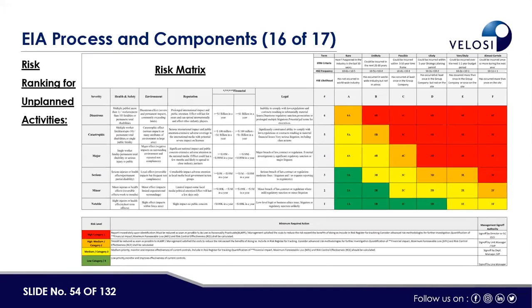Is it necessary to involve a government environmental official for the EIA study? Yes, definitely. As I mentioned in the introduction, before commencement of the project, an environmental impact assessment is required to get an NOC from the regulatory authority. Without involving the government authority, we cannot get environmental clearance, the NOC, from the regulatory authority. So we have to involve government officials at the EIA stage.